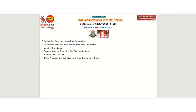In the sixth step, prepare the offer proposal for the firefighting system by keeping some profit margin, and submit it to the main contractor or client. If the client is directly involved in the project, submit the proposal to the client. If there is a main contractor or civil contractor, then the offer proposal shall be submitted to the main contractor.